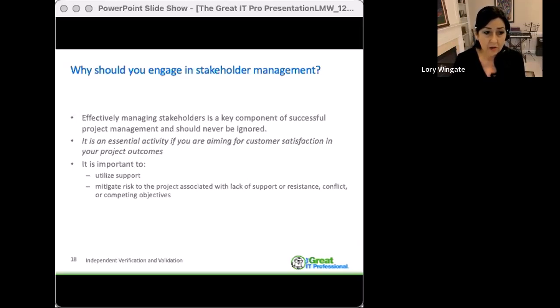So if your customer's requirements are non-existent or vague or extremely high level, that's really okay. You're just going to want to document what they know, and perhaps they know that they want an outcome that is, for example, a next generation wind farm, but they have no idea how to decompose that into its more rigorous elements that are design and build ready. One thing is for certain, if you settle for baseline requirements that you cannot control, that you cannot manage change against, that you ultimately will not be able to test or verify performance against, then getting your customer to be satisfied will be near impossible.